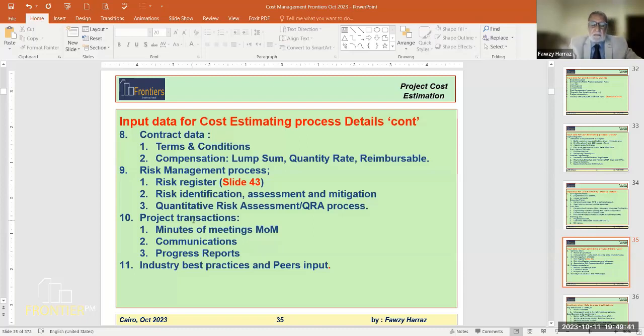In this case, we have the initial cost and then the cost trend, so we get the estimate at completion, which will be the sum of the base estimate plus the cost trend. So this is the value. In this case, the owner will be updated with his final cost at completion based on the project changes happening from time to time.